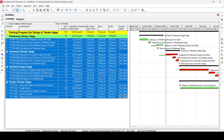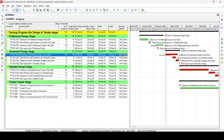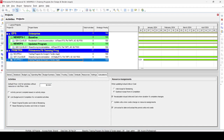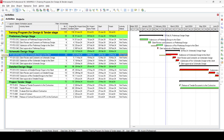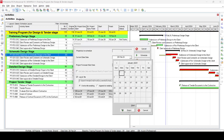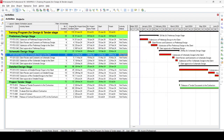Now you can see that all activities show 'Not Started' — previously they were 'Completed' or 'In Progress'. Once that is done, run the program again by pressing F9. The project commencement date is 1st January. In the project dialog box under General, you can see the project plan start is 1st January and the data date is 26th February. After running the schedule again with the commencement date set to 1st January, you can see that the current dates and baseline are now aligned — meaning there are no actuals remaining.